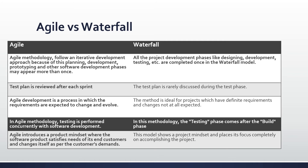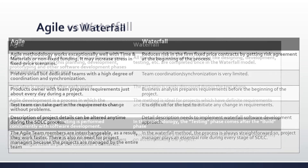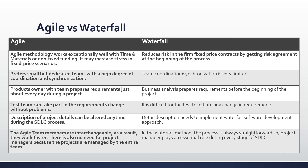In agile the test plan is reviewed after each sprint, while in waterfall it's discussed during the test phase. In agile, requirements are expected to change and evolve throughout development; in waterfall the project is intended to have definite requirements and changes are not expected. In agile, testing is performed concurrently with software development; in waterfall it's only done during a dedicated testing phase. Agile introduces a product mindset where the software satisfies customer needs; waterfall places focus completely on the accomplishment of the project. Agile works well with time-and-materials and non-fixed funding, while waterfall reduces risk on fixed-price contracts by locking in agreements at the beginning.